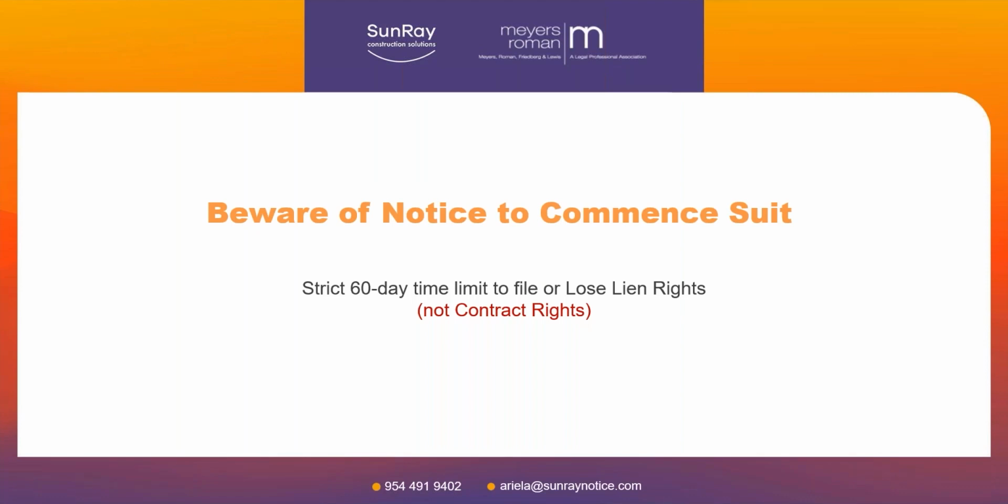And beware of a notice to commence suit. That's the one defense that owners, contractors, the bank, pretty much anybody, can give you: a notice to commence suit. There's a strict 60-day time limit on it. If you receive a notice to commence suit, the very, very first thing you want to do is talk to your lawyer, because you need somebody to get that on a 60-day time clock and be prepared to file a foreclosure action or lose your lien rights.